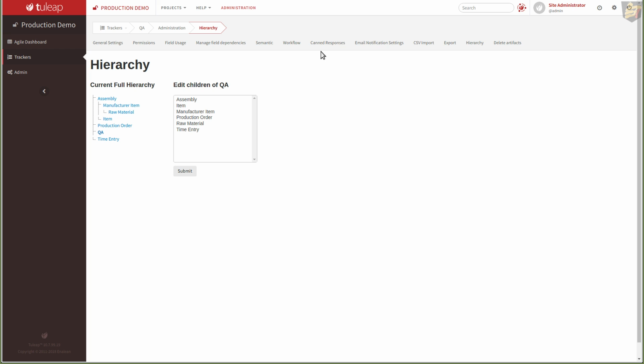And in this particular case, one of the things that popped up during our conversation was not only do they produce this item for a customer, but they also need to get approval from the city, because this gets on the outside of a building. So they need to get the permits from the city in order to do this. But not only that, they don't do the assembly or the installation themselves, so they assign this to a third party to do the installation of the item that they have created. So those I suggested would be broken down into activities.